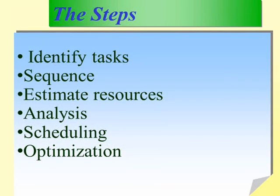The steps are: first, identify the tasks and sequence the tasks. Estimate the resources both in terms of duration and the resources you'll use for each task. Then do the analysis. The analysis will involve many things such as buffer, resource leveling, and critical chain. Then prepare the schedule and optimize it. There are various forms of optimization that we need to do.